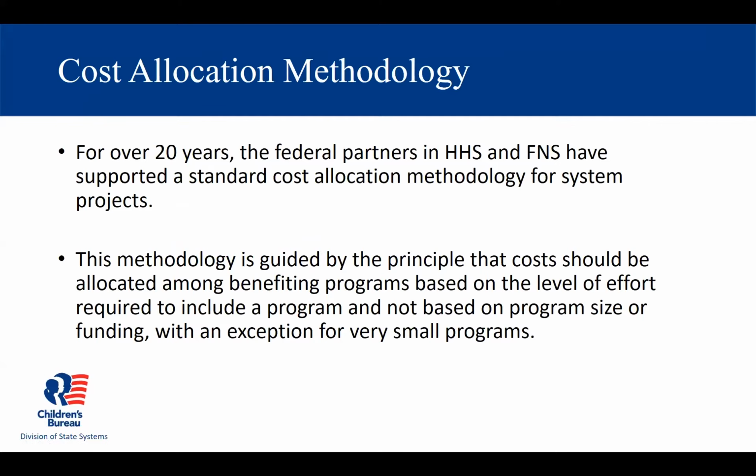The guiding principle of the methodology that we will be discussing is based on the idea that we allocate costs among the programs that benefit from a systems project based on the level of effort required to include that program in the project, and we do not base it on program size or funding. There is an exception that we'll discuss for very small programs, where there's an allocation exception for those programs. Next slide.